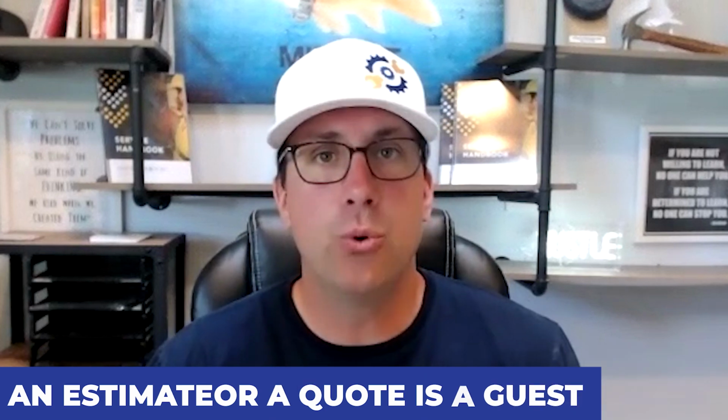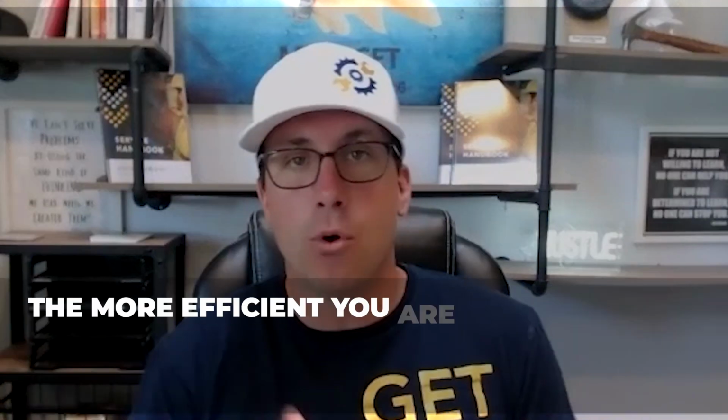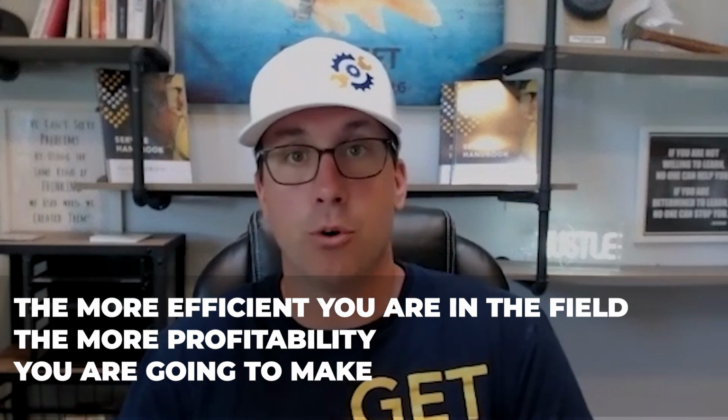Google this. An estimate or a quote is a guess. You are assuming the amount of materials that will be needed. Hopefully you're close, but you are absolutely assuming or guessing the amount of labor that's needed. Now, if you're in a contract, you're probably going to bloat it a little bit. You're going to put some extra hours inside there because the guys get a flat tire, or they don't have materials and have to run to Home Depot, whatever variables you might have inside the project. But that's what it is. It's a guess. And the more efficient that you guys can be inside the field, the more profitability you are going to make.